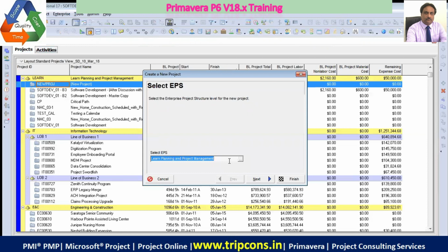Basically, portfolios are a convenient way to look at the total breakdown of the investment and the ongoing values of the projects. Suppose you are a finance person and you would like to prioritize your finances: you can see which portfolio has more investment, or which portfolio requires money but doesn't currently have it. If you are under constraint, you can put the low priority portfolio projects on the back burner and move the finances to the high priority projects.